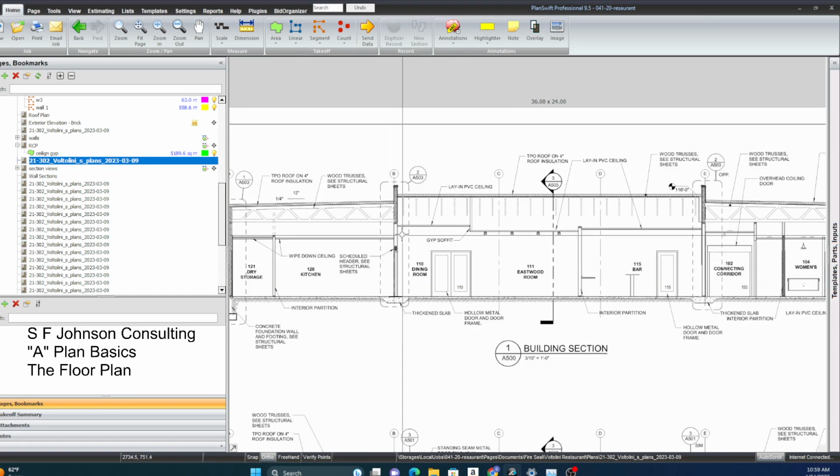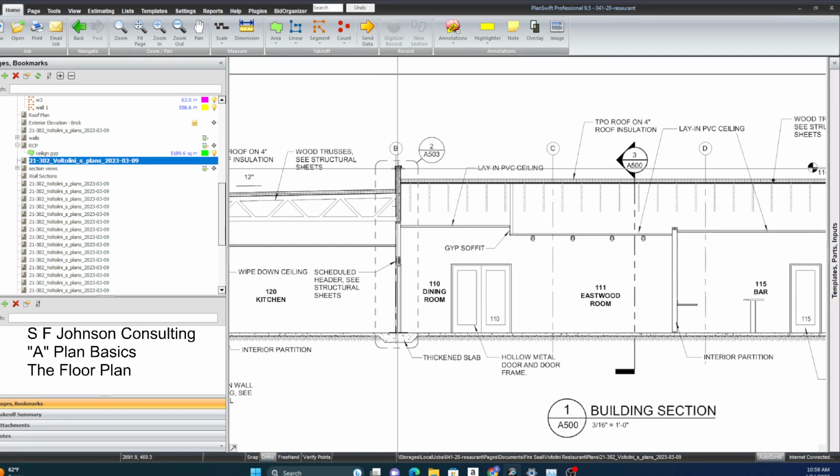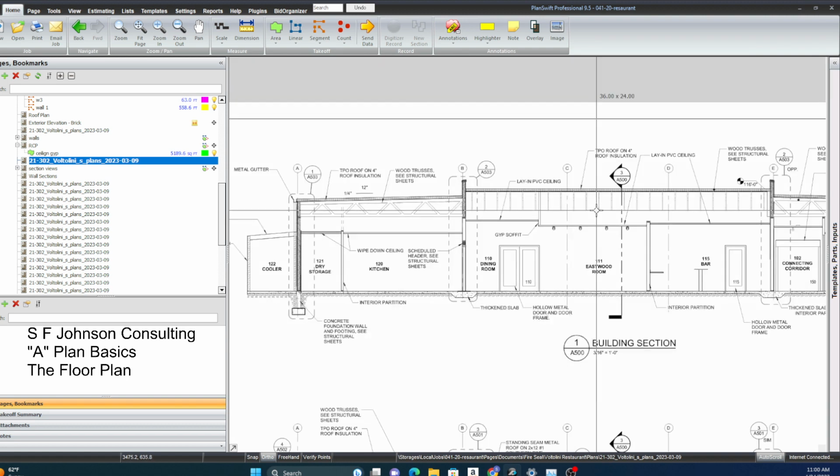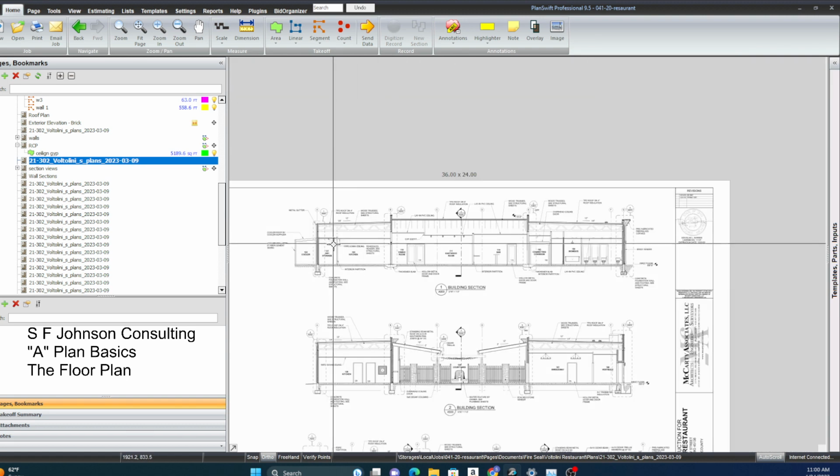And rule of thumb, typically, you know, unless it's a structure wall, it's 10 feet like these or somewhere close to it. It's a structure wall because it's on the footing, so it goes the full length, and some parapet wall above the roof framing. Okay, so that's easy. That's good.